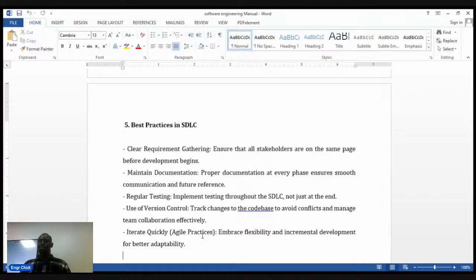It's the planning stage of the software. So implementing the software development lifecycle will help you know that you have to do information gathering, and you do that, meeting all the stakeholders. The stakeholders include the owner of the software and the users of the software, both those that will input the data and those that will harvest the reports.